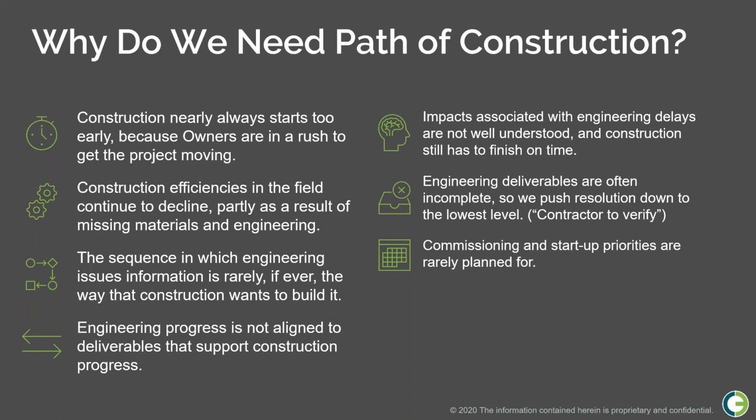So another reason, construction efficiencies in the field continue to decline. And this is partly because of missing materials in engineering. We're not getting the amount of work done for the amount of investment or for the amount of hours that we should be. The sequence in which engineering issues information is rarely, if ever, the way that construction wants to build it. Engineering does things in the way that's most efficient for them. And quite honestly, who can blame them? That was what makes sense. They want to do it as best as they can for them.